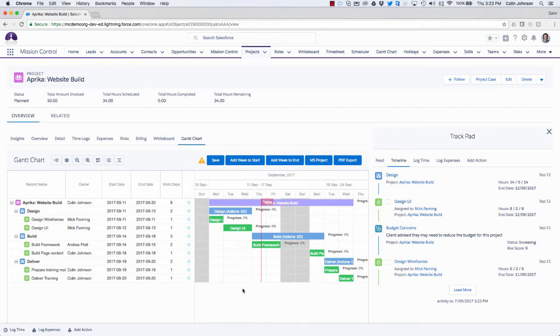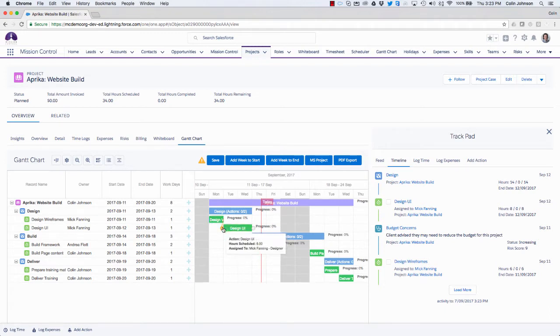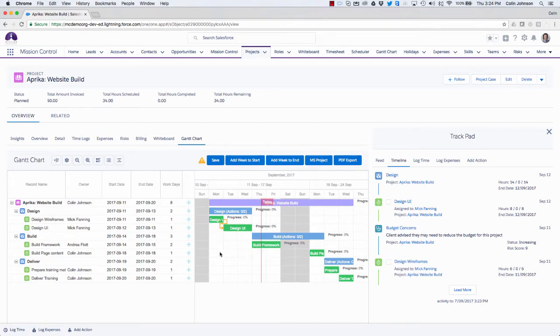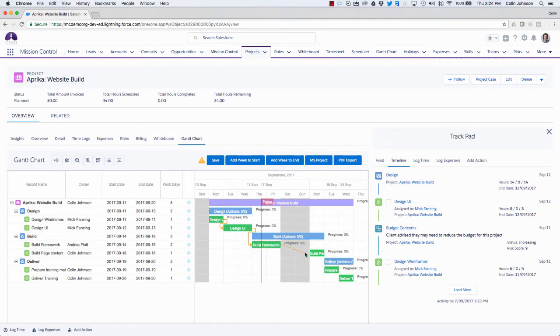So another feature is I'm able to actually create dependencies between the actions. So for example, if design UI is dependent on the design wireframes, what I can do is just from the right-hand side of the design wireframes drag and drop to the left-hand side of design UI, and that will create a dependency between those two actions. So if I just carry on and create a few more dependencies on this project between these actions.